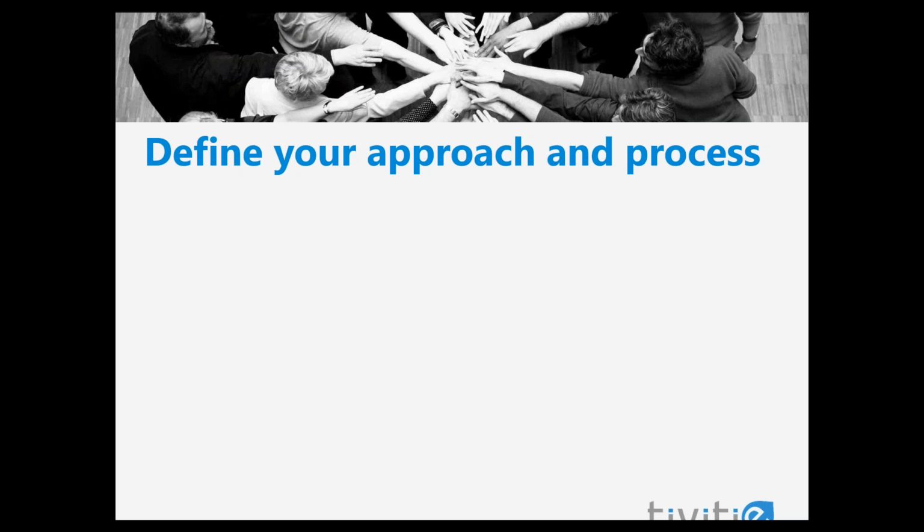It's important to get your processes defined for this feature up front because it really does impact the entire organization. Because both project managers and resource managers are involved, it's critical that the method, criteria, and timing for requesting and approving resources is well understood. One of the first things that needs to be decided is whether resource engagements will be used for near-term negotiation of resource time, long-range planning, or both.